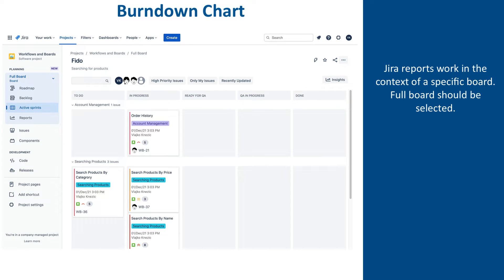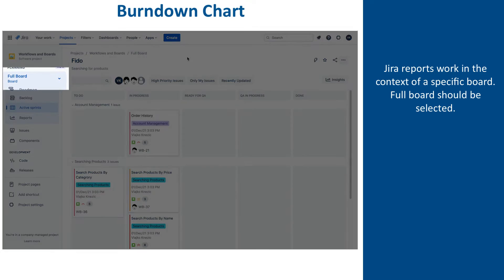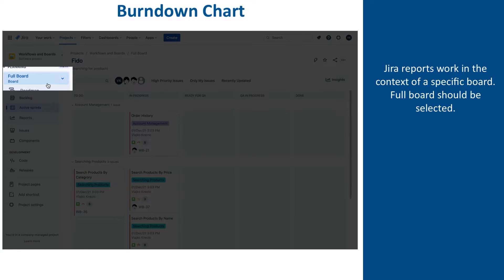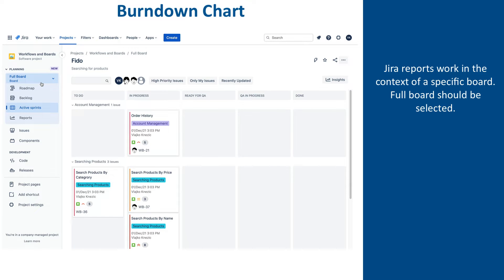Let's have a look at the burndown chart for our Scruffy sprint. But before we go there, make sure that full board is selected. Remember, we earlier said that most of the reports work in the context of the currently selected Jira board, and we want all issues to be included in the report, so we need full board selected. We will soon see how switching boards affects reports. So, with full board selected, click on Reports and then click on the Burndown Chart.